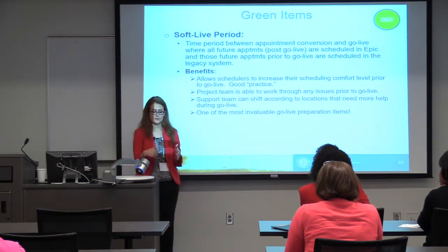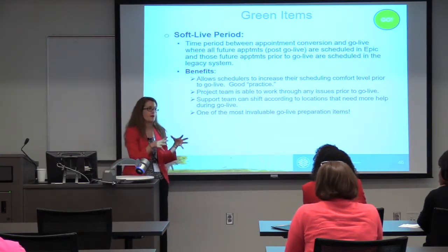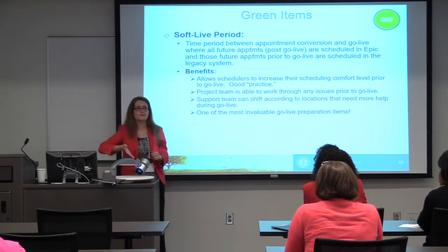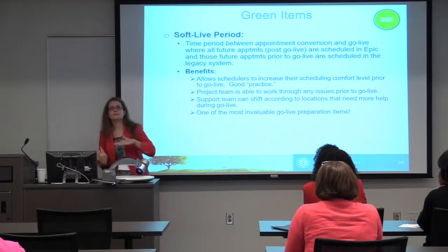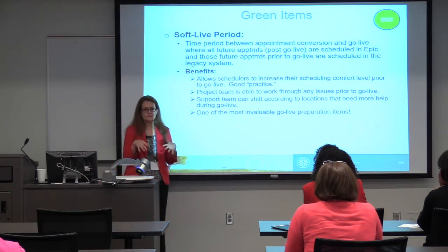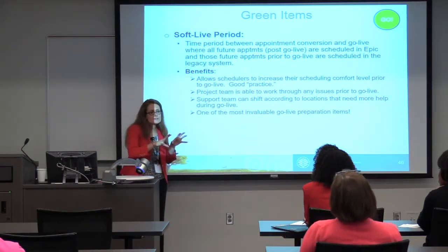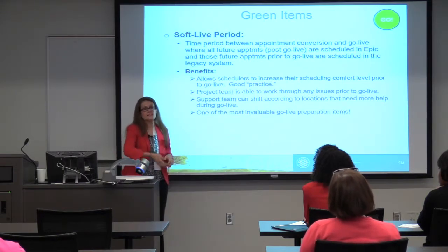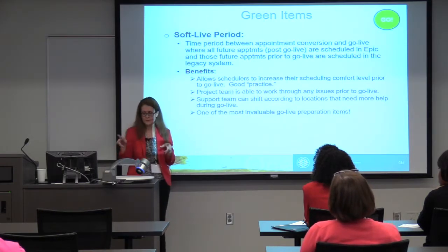During these two weeks, we're able to really focus on our ambulatory practices that went live. Then on the night of cutover, we shift our focus and start really focusing on the acute side. So during this soft live period, we're able to focus on ambulatory and fix those issues before they add additional work when we 100% go live.